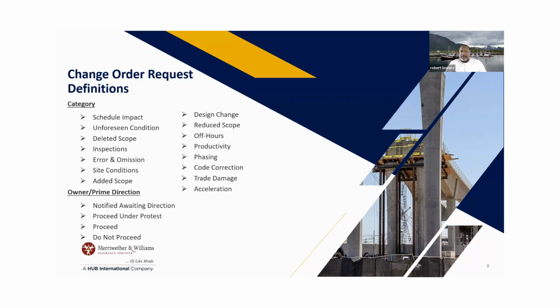So you get the job and you start working, you say, hey, this isn't right. Something is missing here. You'll submit a request for information, RFI. They'll come back with a response and say, oh, please proceed with this. Okay, and that was on them because the design team made an error or omitted something by accident. And what's going to happen with these, the owner is going to go back to the design team to collect money to pay this change order.